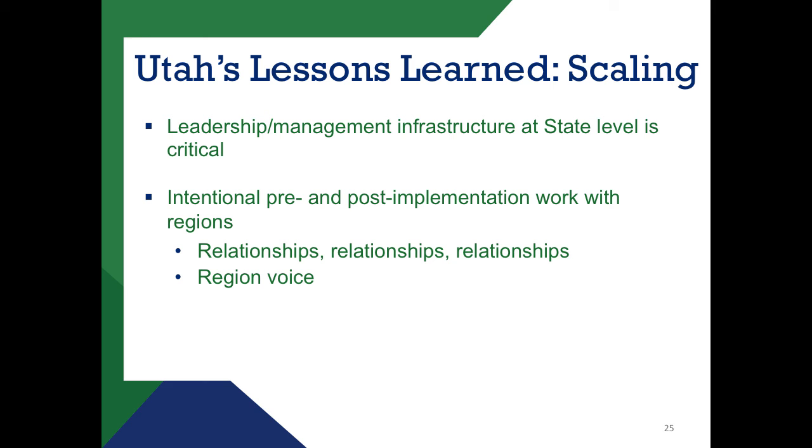In this pre-implementation time, one of the things we did is really worked with each region to look at the specifics for the logistics that would work for their regions, for how the implementation launch would work and what kind of implementation post supports we would provide. It also gave us the opportunity to anticipate and plan for what the impact was going to be on staff, to be able to address things like pockets of resistance and other concerns, and to address some of the unique cultural aspects for each region.